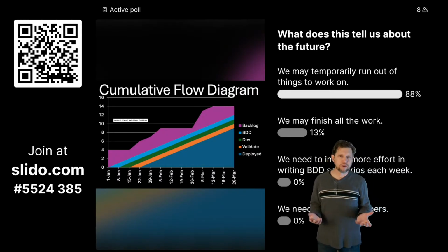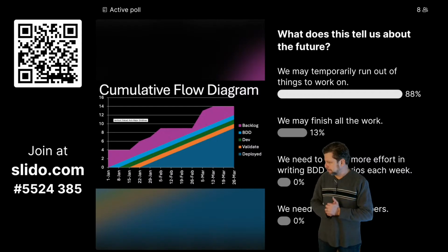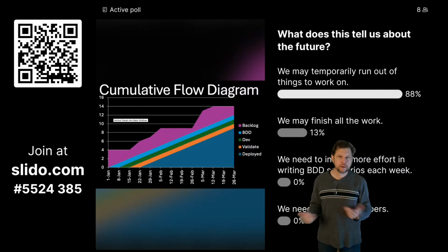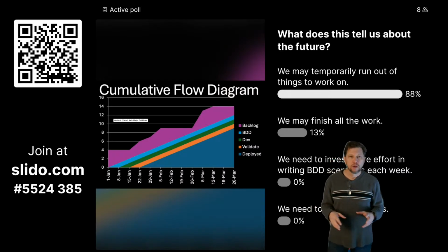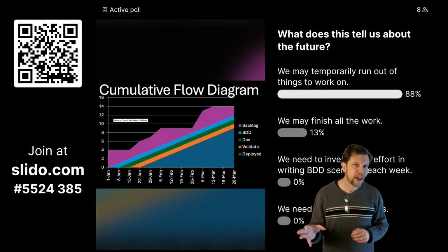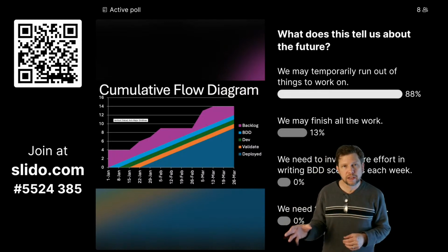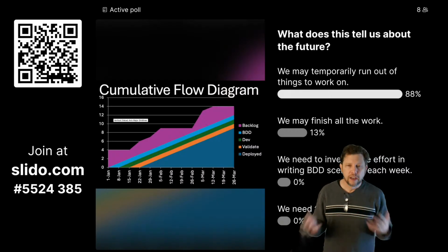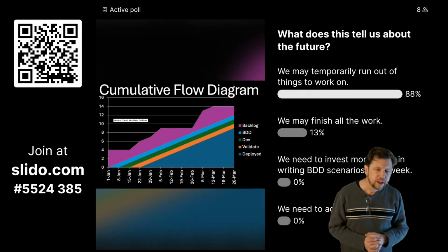What we might consider doing is there may be some technical debt items that we want to put on the backlog at a lower priority. So if we ever run out, it's like, oh, here's something that will be really valuable to us in the long term, but we're not willing to give up what the customer's asking for to do this. Well, if we run out of things the customer's asking for, we can deliver that and increase our delivery capability.